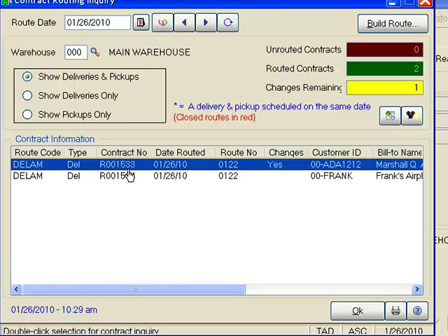That gives me the opportunity to go ahead and do a little bit of due diligence, make sure that the pulled activity reflected those changes and everybody's good to go. And that way I can deliver everything in a single trip instead of having to make a hotshot delivery out there to pick up or add something that we might have missed during the change order process.